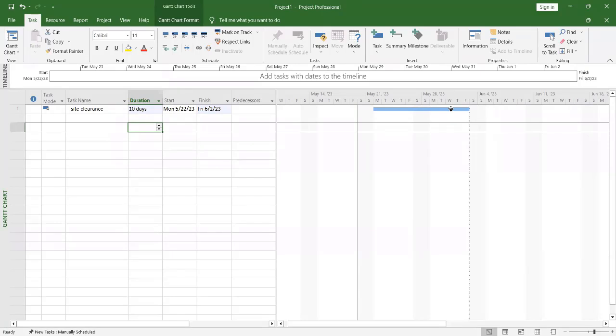But when you set your calendar that you want to work on Saturday, especially in the construction industry, at that point it will no longer jump that Saturday again. So your calculation will be based on Saturday as well, that you're going to include Saturday in your working days. So this is how the interface works.